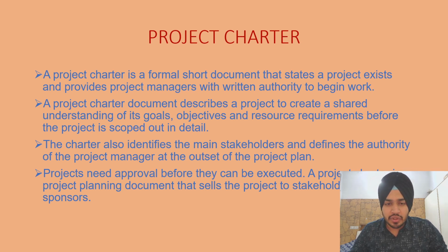A project charter document describes a project to create a shared understanding of its goals, objectives, and resource requirements before the project is scoped out in detail. So the project charter would include the goals, objectives, and also the resource requirements. That probably would be needing two database administrators, and we would be needing two business intelligence people that would be taking care of Tableau and so on.